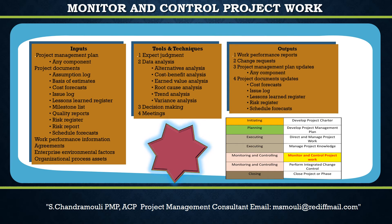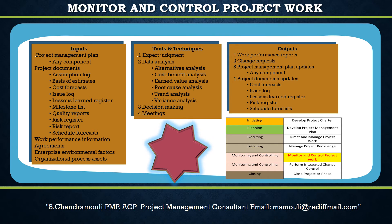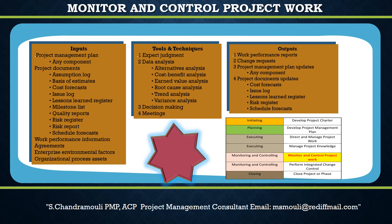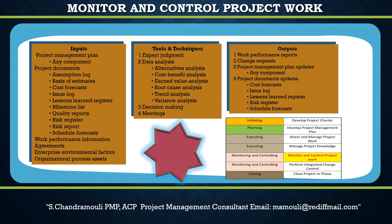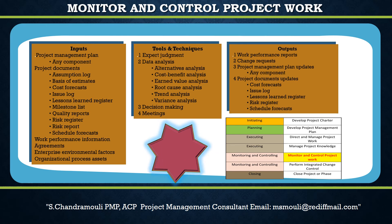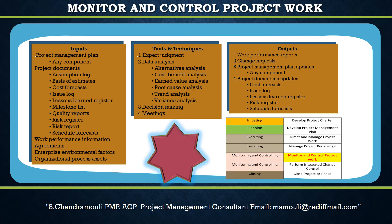For projects not using earned value management, variances against planned versus actual expenditures and forecasted final costs are provided. The next input is Validated Changes. Approved changes that result from the Perform Integrated Change Control process require validation to ensure the change was appropriately implemented. A validated change provides the needed data to confirm that the change was appropriately executed.